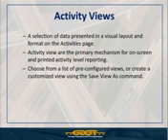Also, the activity views are the primary method that you have for doing ad hoc reporting out of your schedules, right? So any activity view that you create, you can also print as a hard copy report. The separate reporting piece of Primavera is really hard-coded reports. Whereas with this, you have the ability as an individual user to pick and choose what data you want to display in an activity view.